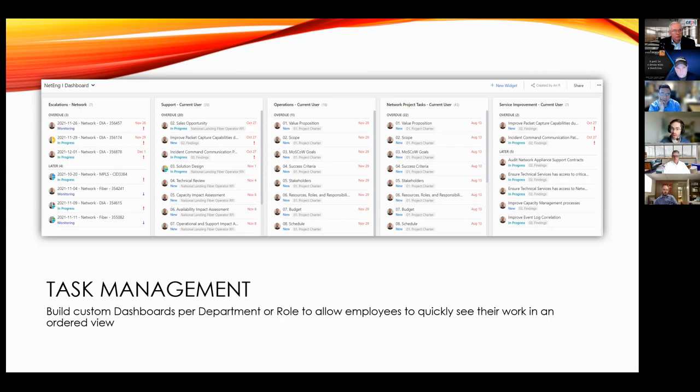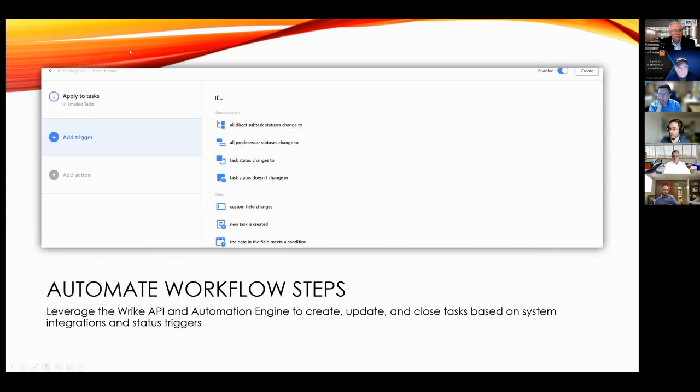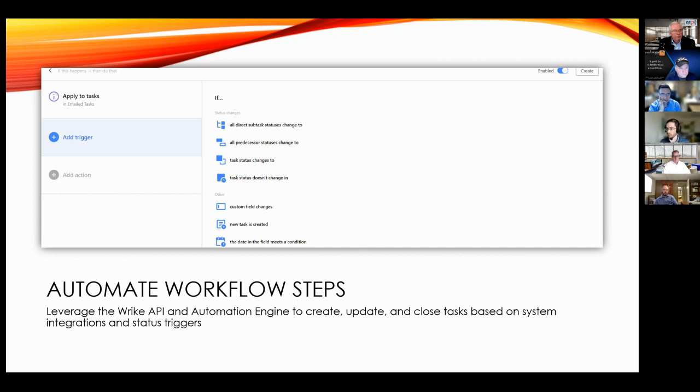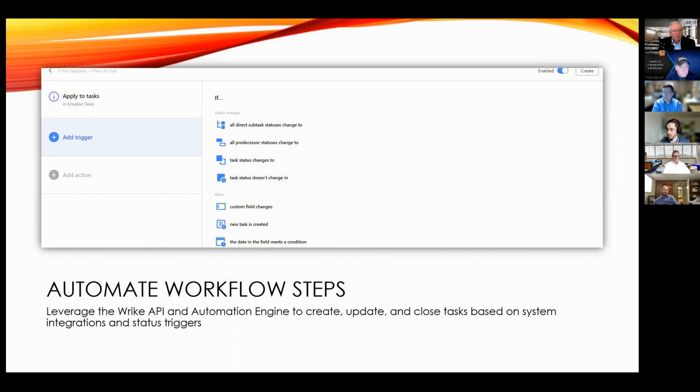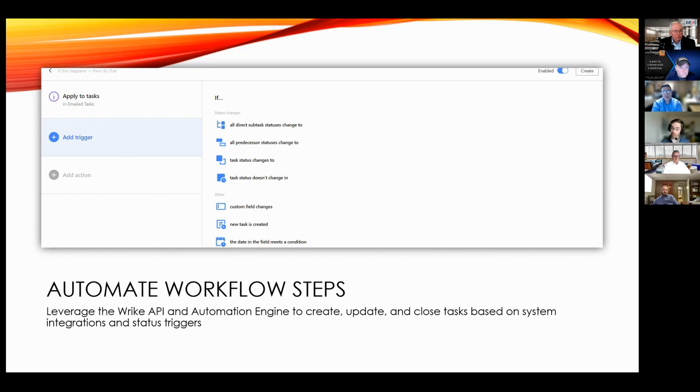One of the other items that we're using within Wrike was its recently released feature around automating workflows. They have introduced APIs and an automation engine that allows you to look at triggers, which could either be time or status based, and perform specific action. So a lot of the triggers and automation that I've been using within Wrike have been to add folders, i.e. tags, to projects so that if an escalation hasn't been responded to in three days or hasn't been closed out, the manager and the engineer gets a reminder all through Wrike. I don't have to do anything. I don't have to check in the morning. The system does it automatically for me. It can also close out projects that have all the tasks complete or warn of ones that are getting into jeopardy or at risk areas.